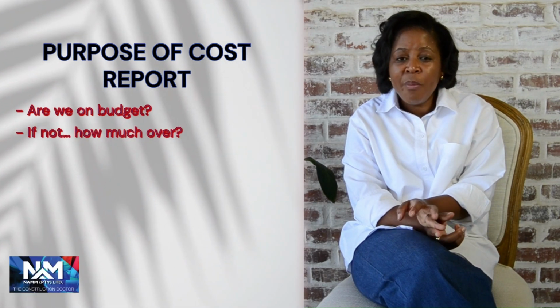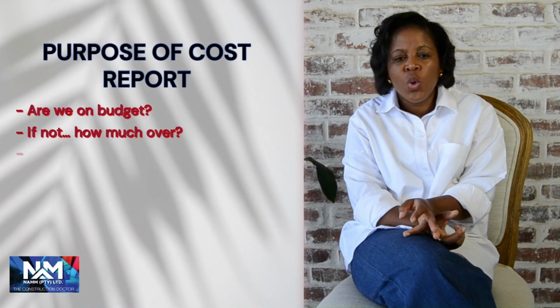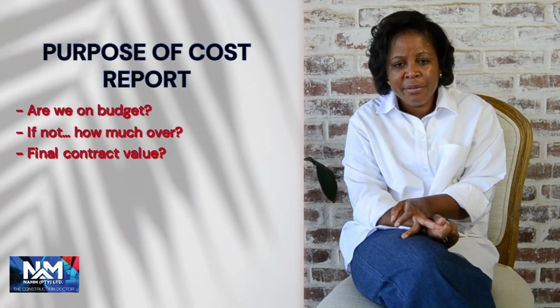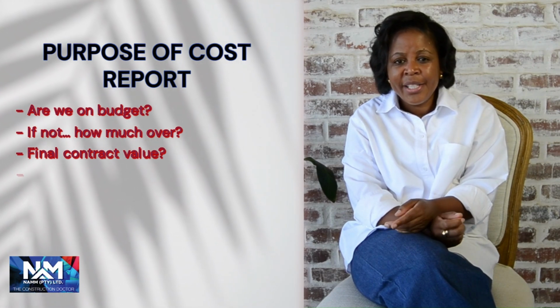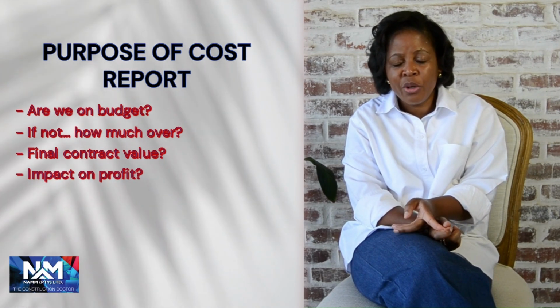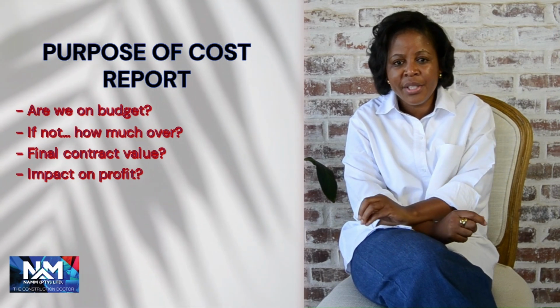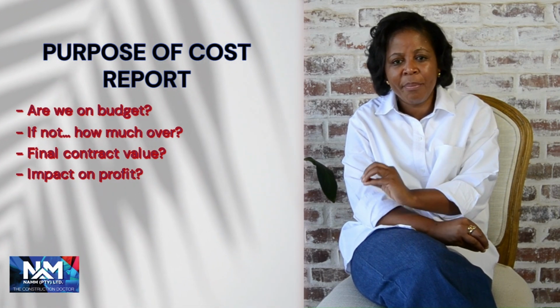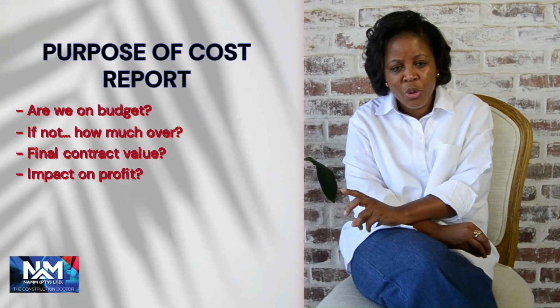If I am not, how much have I exceeded it by? Where do I see the final contract value being? And if the project is meant to make a profit, what are the effects on the profit anticipated for the project? So, depending on who you're working for, a developer or a contractor, you will do it differently because you are now monitoring different things.